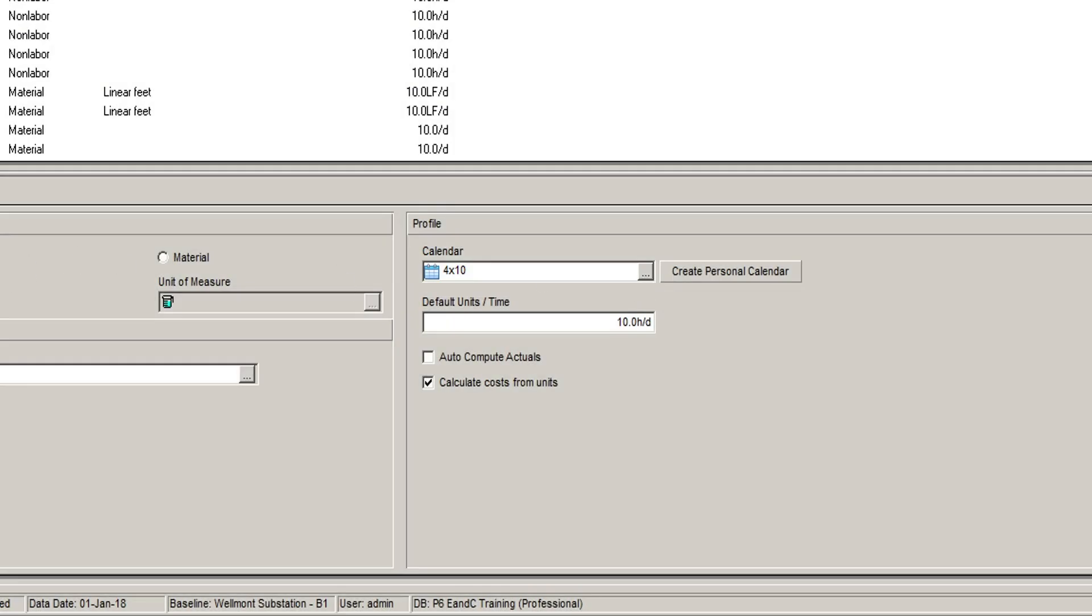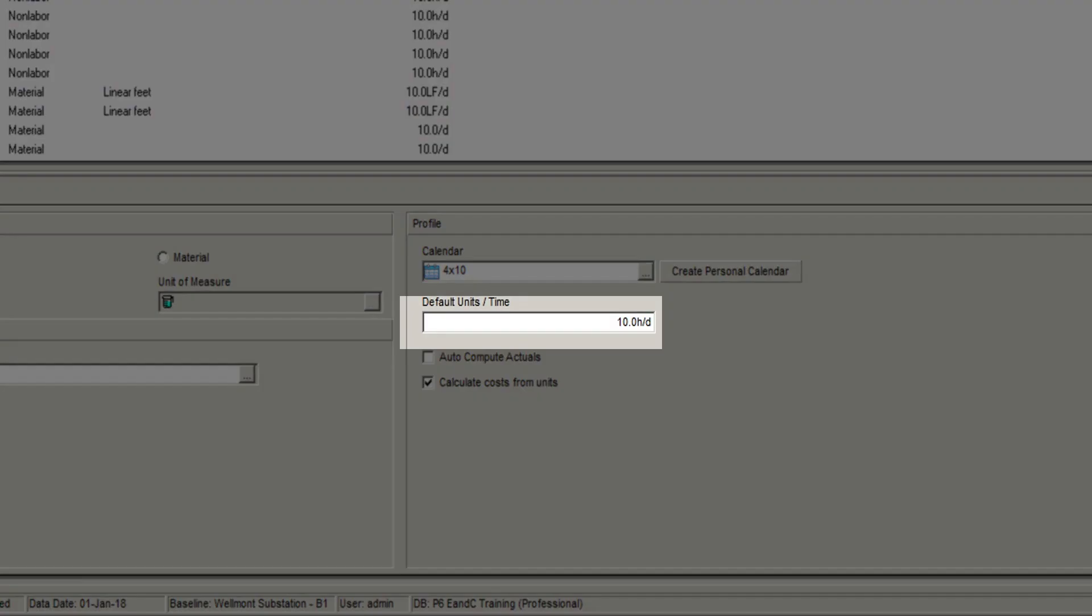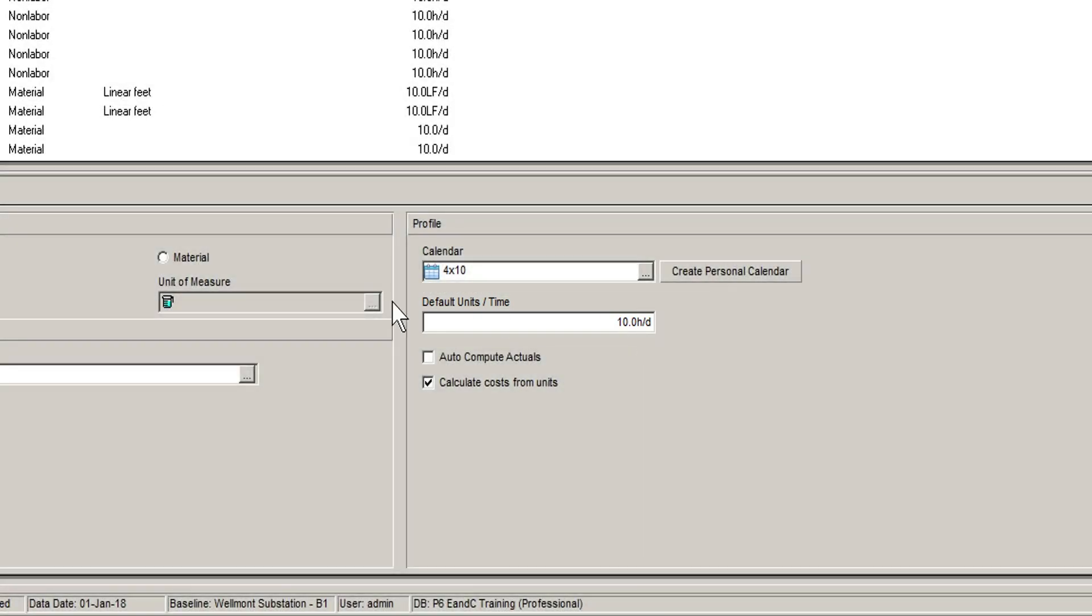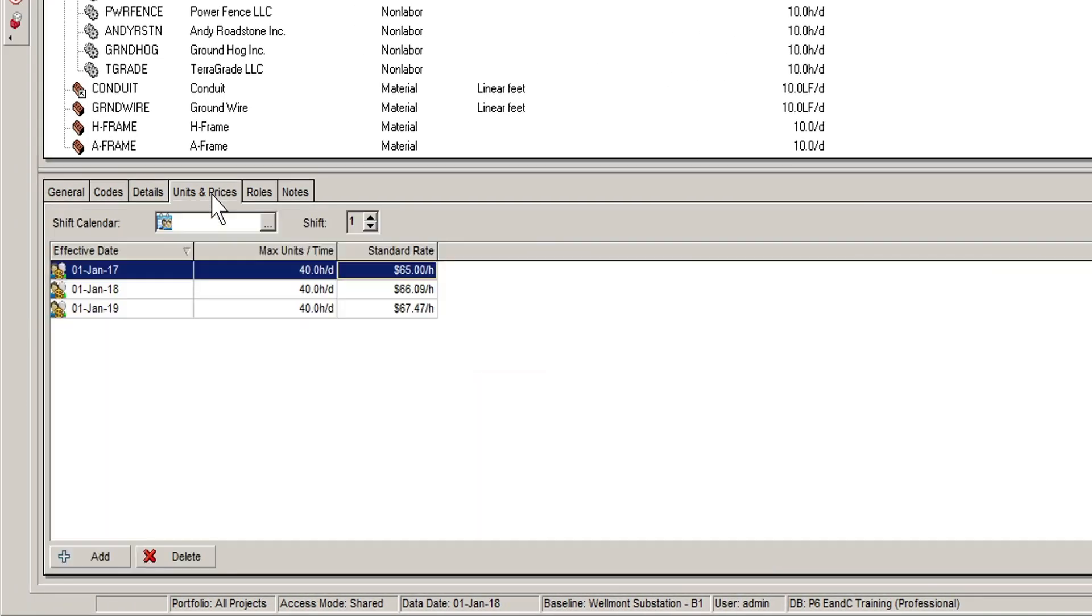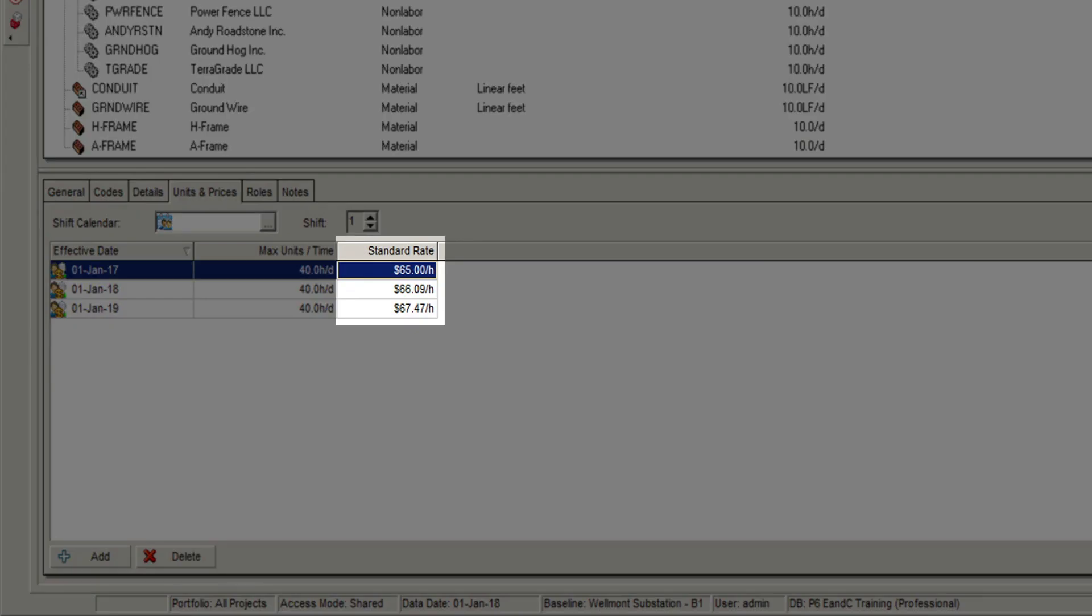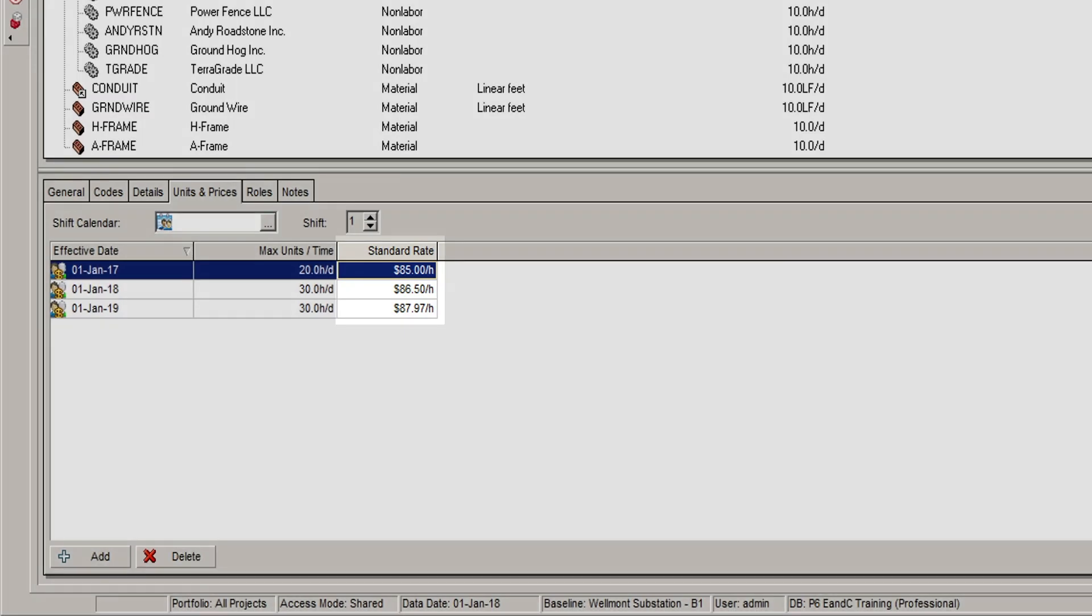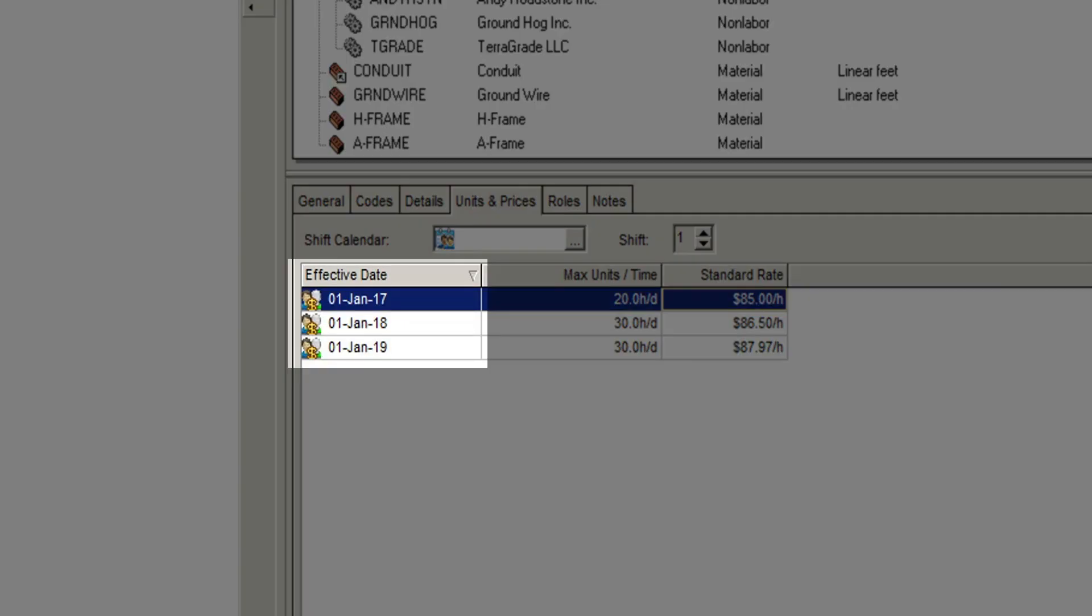And you can also assign a default unit's time value, which is the amount that will be allocated to a resource when it is initially assigned to an activity. In the Units and Prices tab, you can see that every resource can have a cost assigned. An effective date option also means that you can increase the cost over time and allow for escalation and forward pricing.